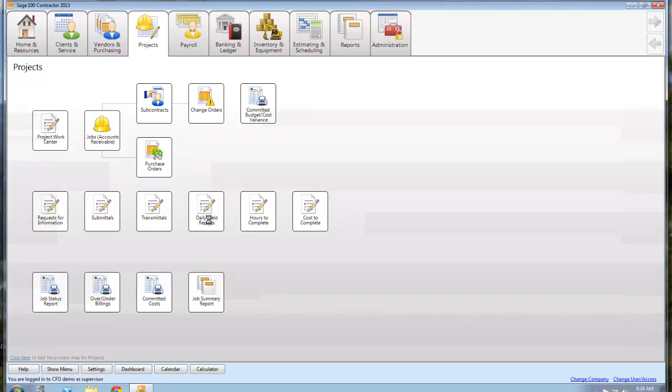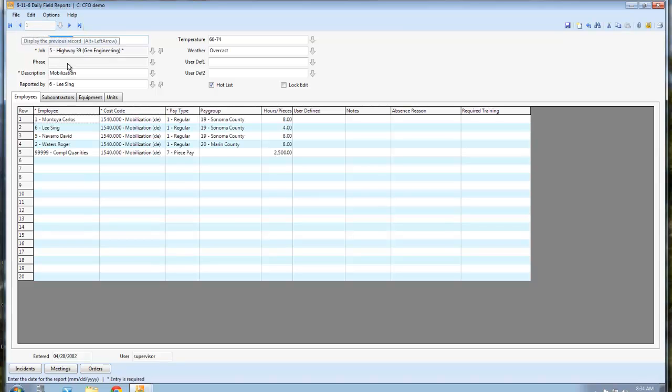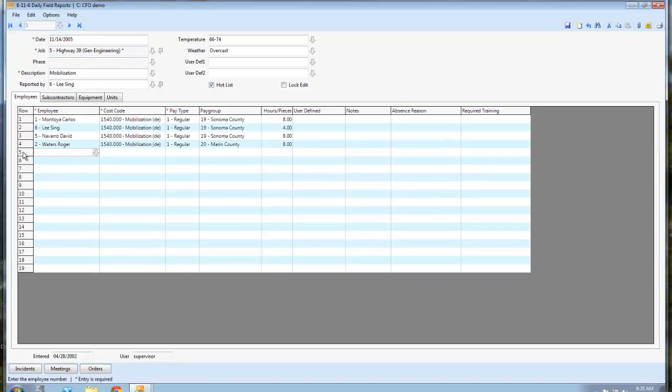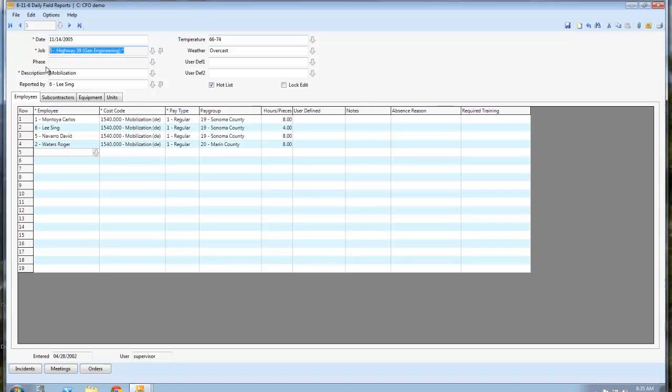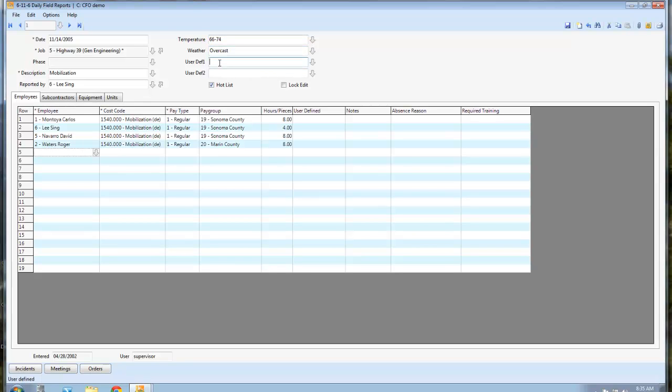So let's just jump into daily field reports real quick. And I've got one that's already filled out, so this is something you fill out obviously on a daily basis: today's date, what job is it for, what am I doing today, which person actually reported this. This could be important, especially if you're doing concrete work—what the temperature was, what the weather was like. And I've had people use these user-defined fields for a lot of different things, but a lot of them will put who the inspector was that day.